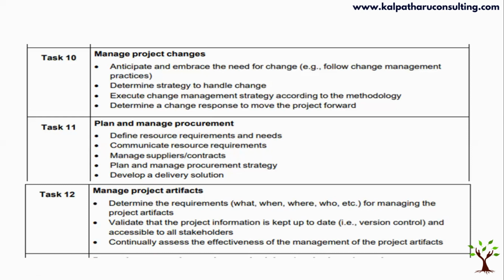Those resources which are not available within the organization, you're going to buy from the market. You're also going to analyze, are we going to make this product or buy this product? If you're going to make this component, it becomes a sub project. When you're going to buy, then it becomes your procurement. So again, you're going to follow a step-by-step method to identify what exactly you want in your project.